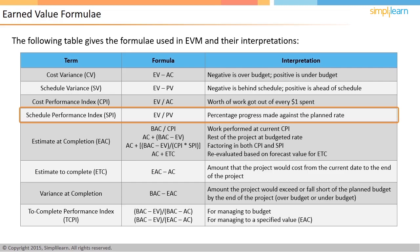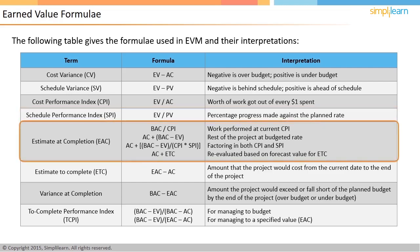The estimate at completion (EAC) can be calculated in different ways depending on how cost and schedule variances are expected to play out for the rest of the project. BAC divided by CPI is used if the current cost performance is expected to continue. AC plus BAC minus EV is used if the rest of the project will be managed at the budgeted rate. AC plus (BAC minus EV) divided by the product of CPI and SPI is used to factor in both cost and schedule variances. AC plus ETC is used if you want to reevaluate the project based on a new forecast.